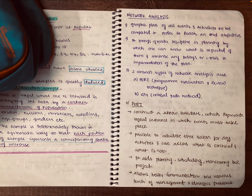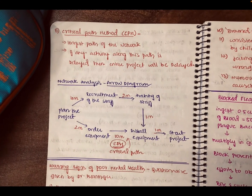So network analysis is a graphic plan to reach your end goal. Involve all stakeholders so they know what is required and expected of them, minimizing delays. There are two types: PERT and CPM. The critical path is the longest pathway — it requires the most time, and any delay will delay the whole project. It appears within the PERT arrow diagram. By drawing the arrow diagram you'll know what is critical and what is not, and you can plan accordingly through better planning, scheduling, monitoring, and communication.